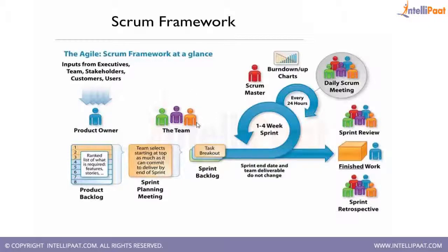So you would also hear a term called time box most of the time. So you'll see that this team works within that fixed time box. When we say time box, it is generally just a time window. So let's say 1 week or 2 weeks or 3 weeks. Scrum says you should not have your time box any bigger than 4 weeks, because then it becomes too big, a bigger amount of time where you cannot collaborate real quick or see your progress. So it should be really small, and this time box where you are executing a set of tasks is called a sprint in the Scrum framework.